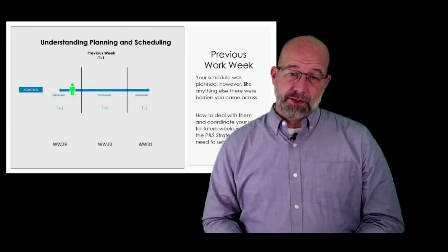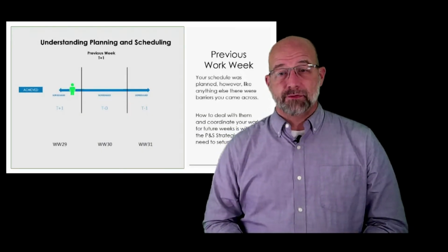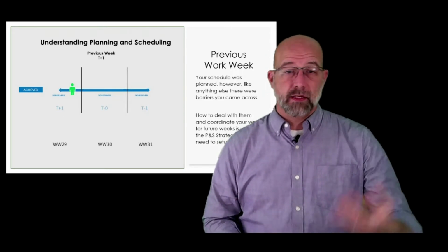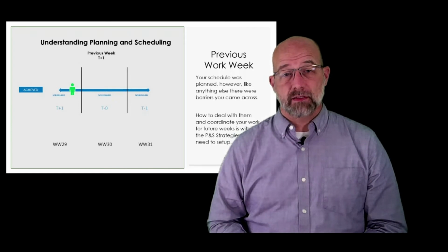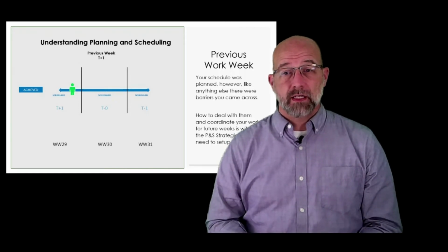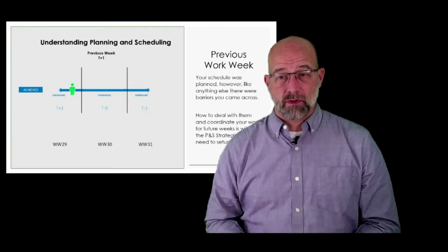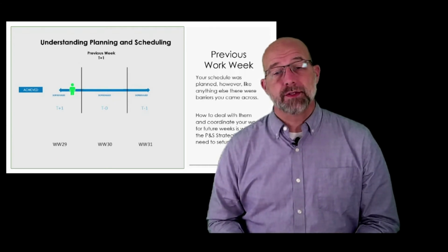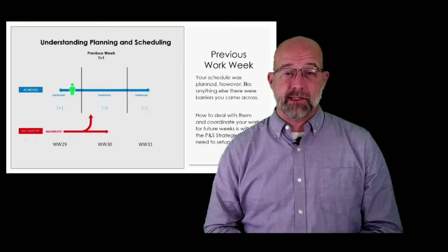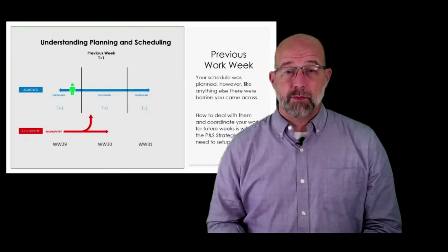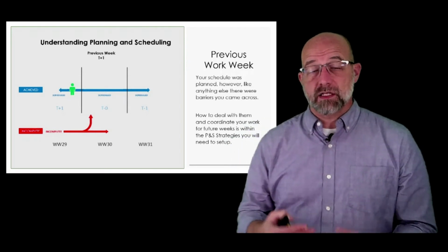Normally, what we're going to do is look at the previous work week and find out what's going on, why we didn't get something done, what we got achieved, especially, so that we can have some good conversations about what we did well and if we need to do anything. However, most times you're going to have incomplete work that is necessary to reschedule in a forecasted work week. So it's important to have scheduling meetings where you can do this.